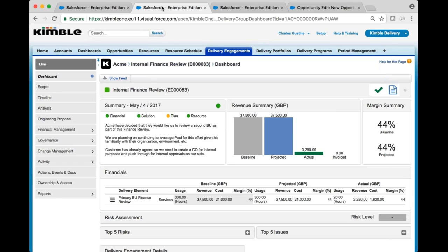Given the amount of increased scope, we want to require an approval process internally for this change. Although since there's no additional sales commission and the client has already signed off on it, we don't need this in the sales pipeline via a new opportunity. So given all of those details, we'll need to handle this with more than just a simple narrative-only change.